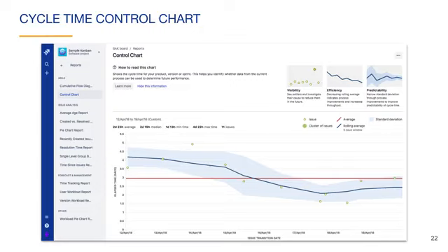In general, you would like to see the team improve the cycle time, as is done here. Trending down means that issues are completed faster as time progresses. The red line indicates the average cycle time for the period of the chart. The shaded band indicates the standard deviation of the cycle time over time. That band becomes more narrow if all of the issues are completed with about the same cycle time. Process improvements can narrow this band, increasing the predictability of the team and improving estimates.